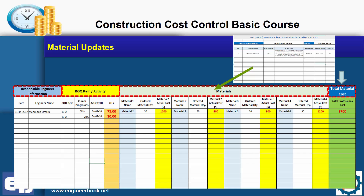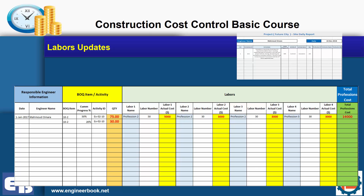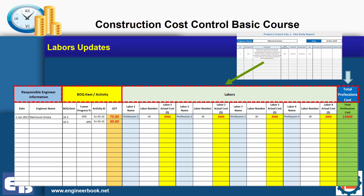I may have five, six, or ten engineers and I need to put all the data in one place related to materials. Similarly, we have the labor updates form. From the daily report from the site, we can create this form to collect updates in one place. We have the engineer name, BOQ items, hours for the labors, and of course the cost. I will also teach you how to link Excel sheets together so you can minimize your efforts, automate this process, and reduce the required working hours. We have the labor name, labor rate, and cost — a very simple process.